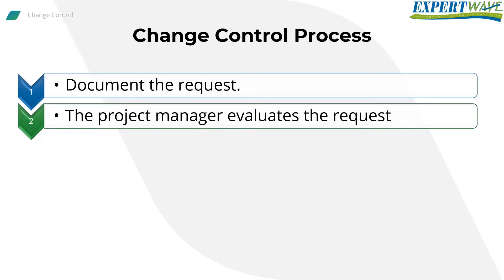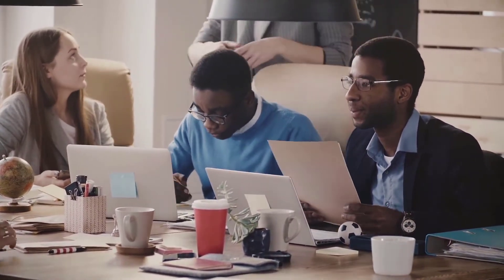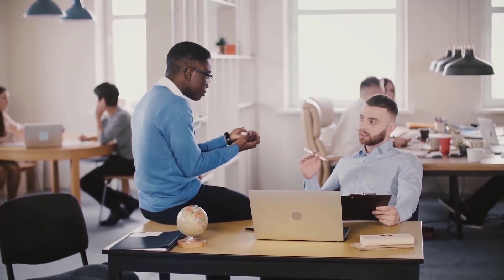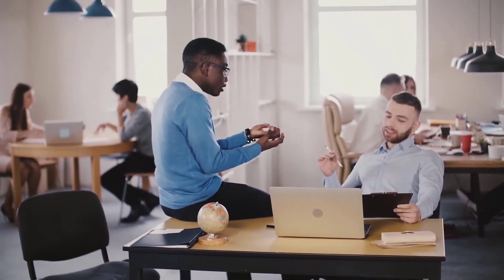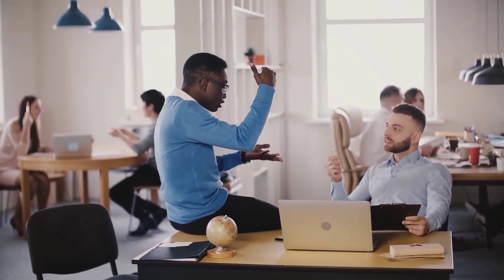If the request is way beyond the project objectives, the project manager can reject it right away. For example, I once had a customer asking to add cloud computing support to an inventory system just because he heard cloud computing is good. Also, a developer once asked to add a button to a web page just because he had the code ready. Those kinds of changes delay the release date without anyone realizing what's going on.